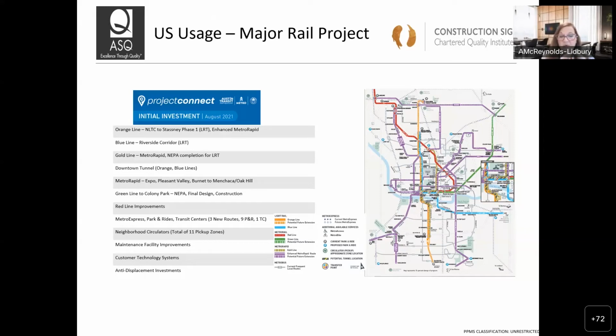So that number just kind of exponentially grew. And everybody's facing the same things. It's due to market conditions, material costs, labor costs, those types of things that have all affected most construction projects and design projects over the course of the last few years. But as we reevaluate what we're doing, the tool will come in very handy as we holistically look at the approach.